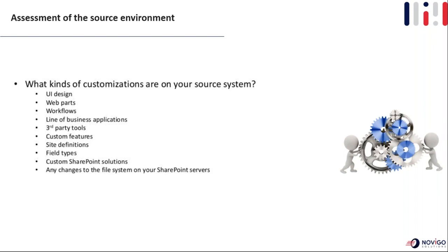So for most of these customizations, if you have an inventory, we can migrate them to the target environment with minimal effort, because we are taking a complete database backup of our source and restoring it to the destination SharePoint 2016 farm. So the impact is going to be minimal. But if you are migrating, let's say, SharePoint 2013 to a SharePoint 2016 farm on the target Active Directory, it makes a lot of sense to have a complete inventory of all the customizations in your system.